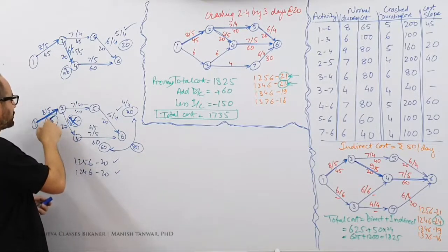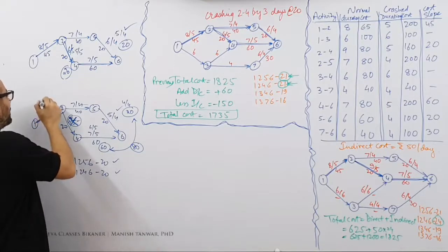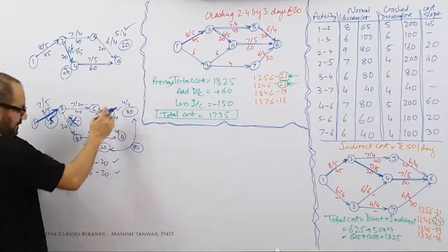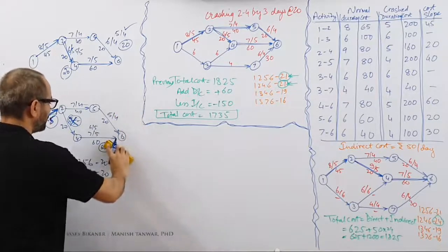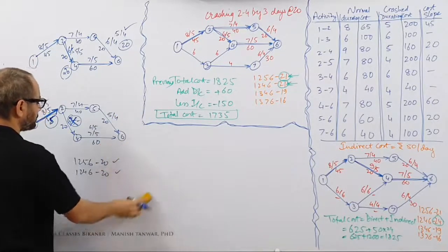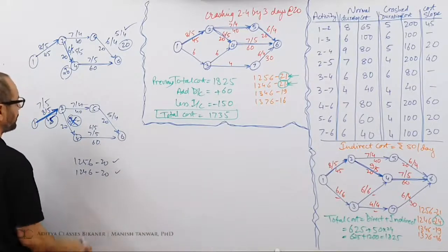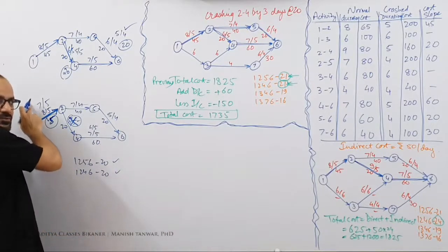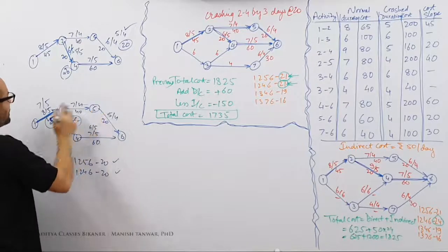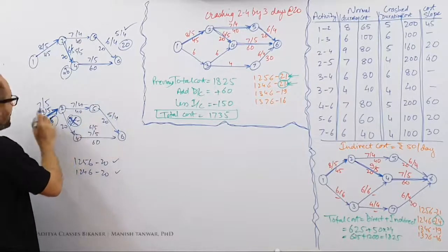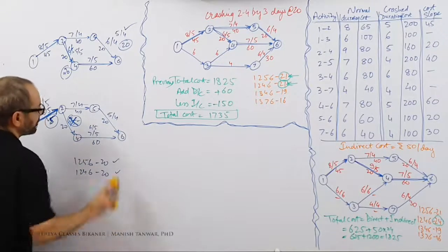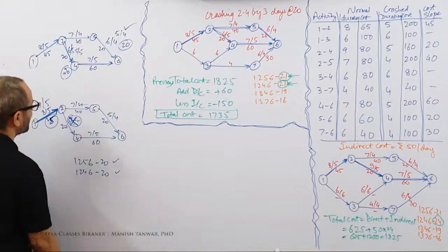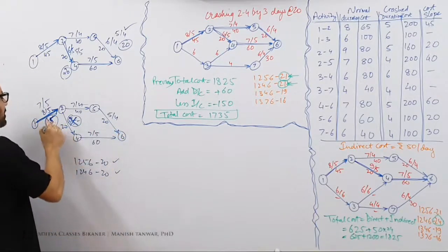So if I make a payment of only 1 day over here, leave this. We are not making a payment of 4 over here. Rather what I decide is, I'll bring this 8 down to 7. So 1, 2, 5, 6 comes down, 7 and 7, 14 and 5, 19. 7 and 5, 12, 12 and 7, 19. I'm not making this crashing. So everything is down to 19 and I'm only making a payment of 45.